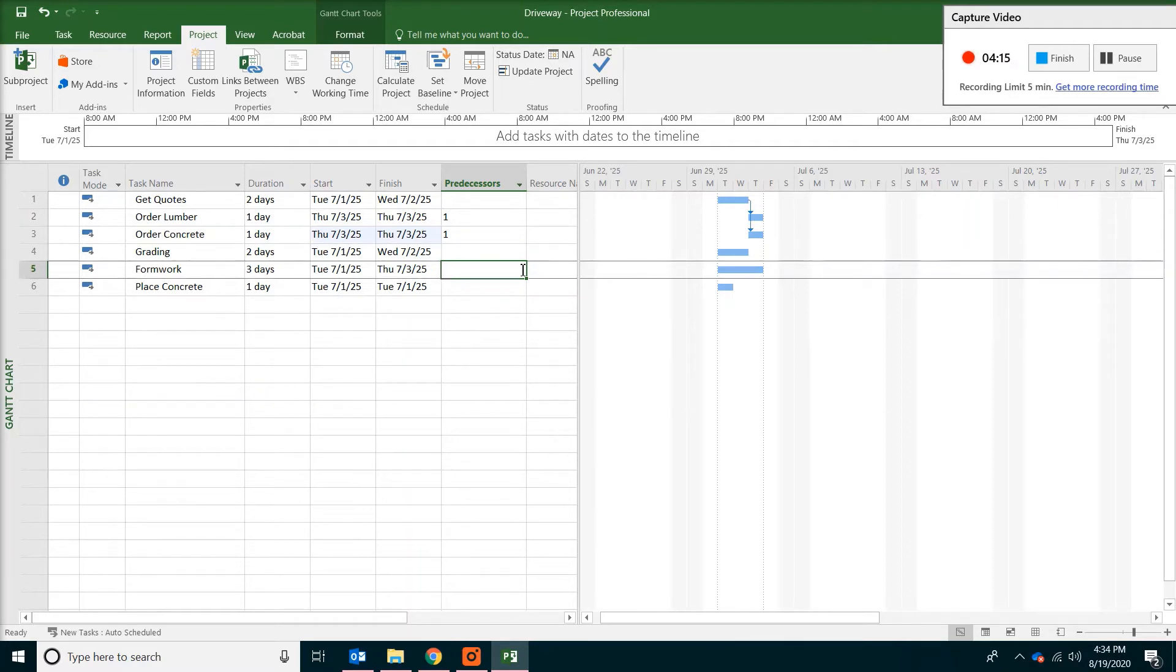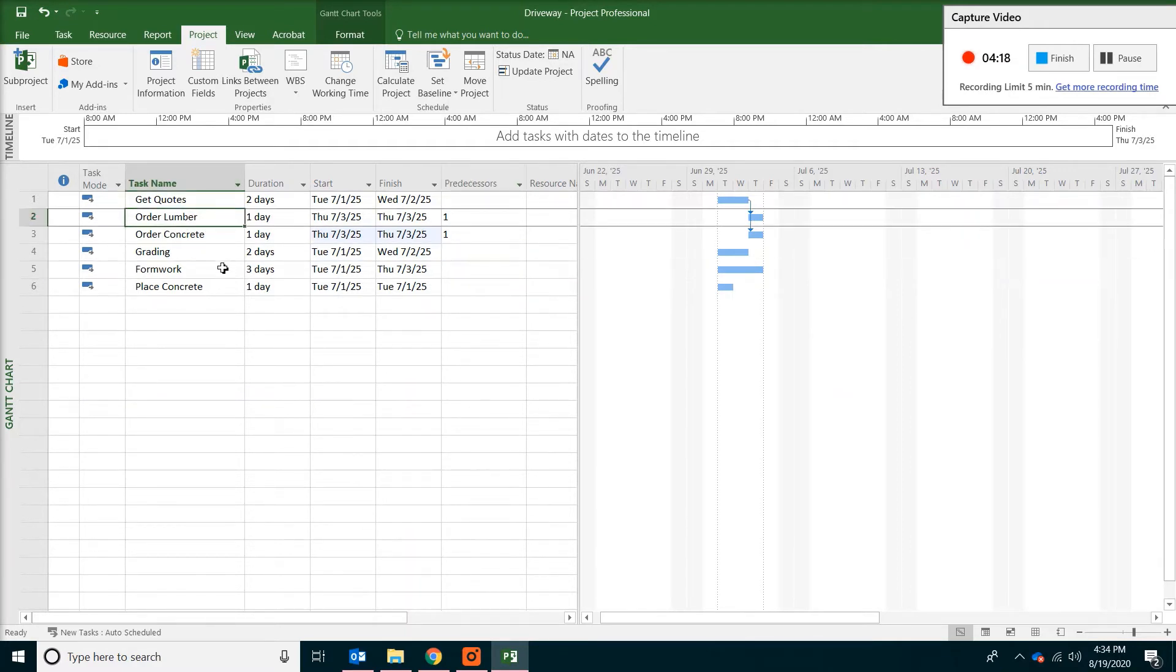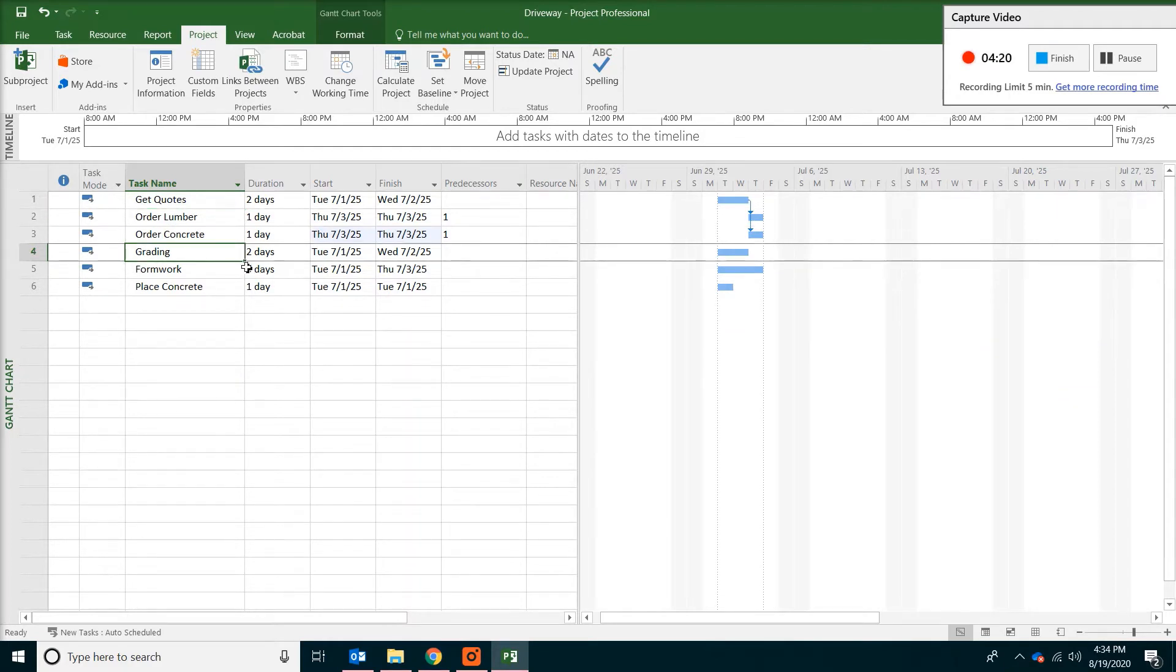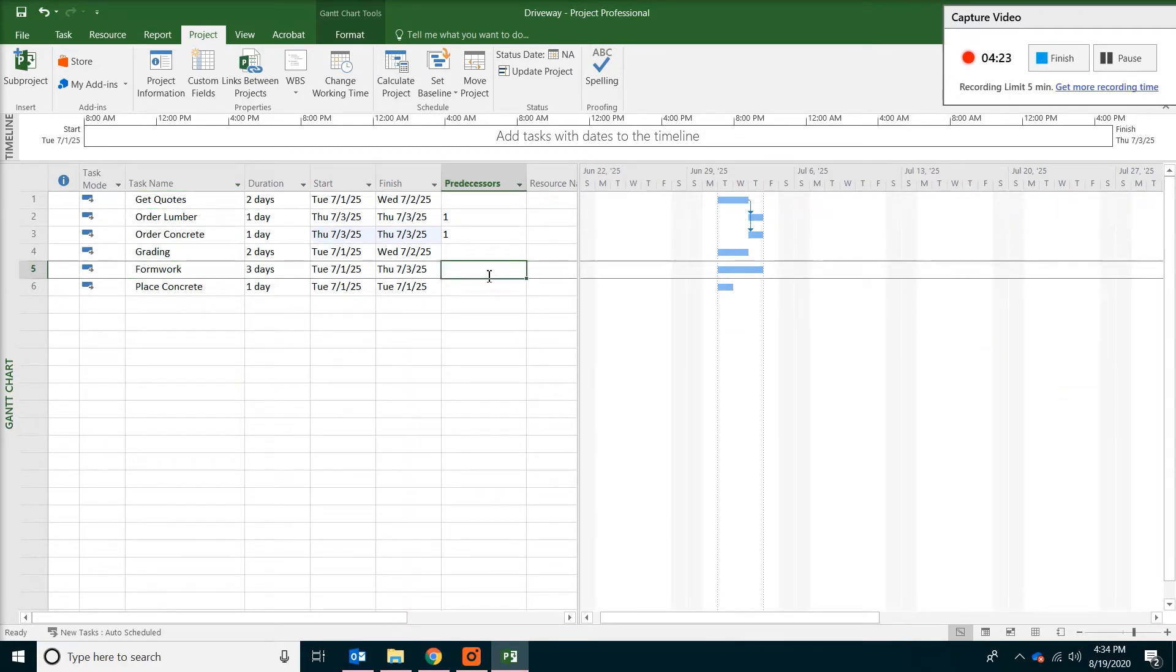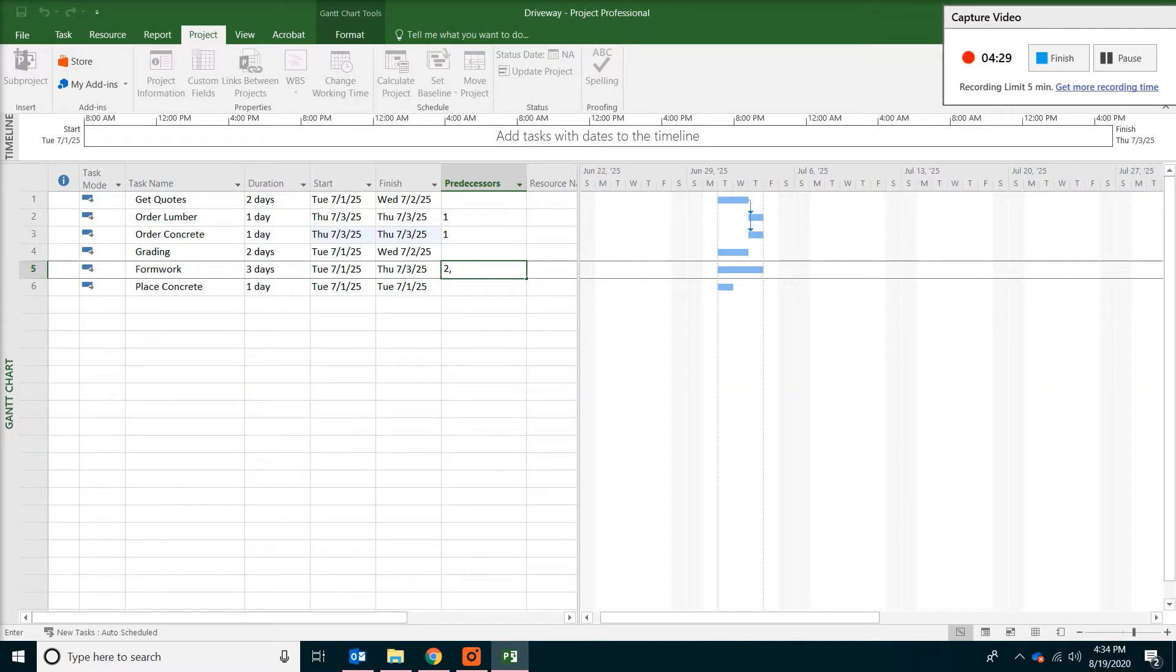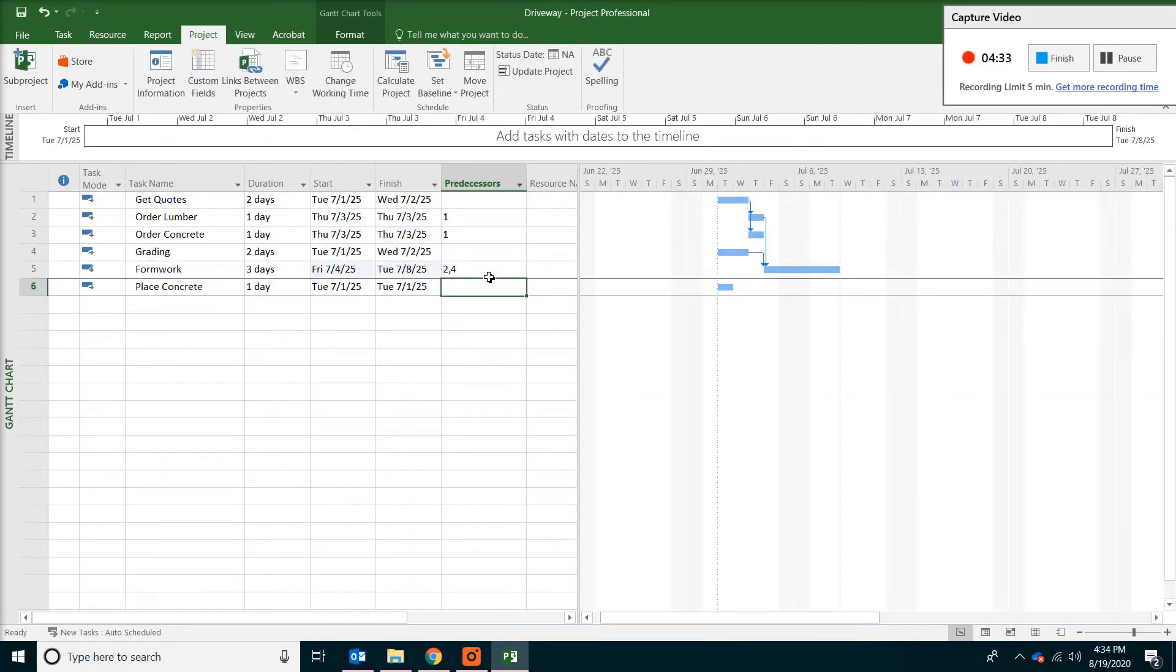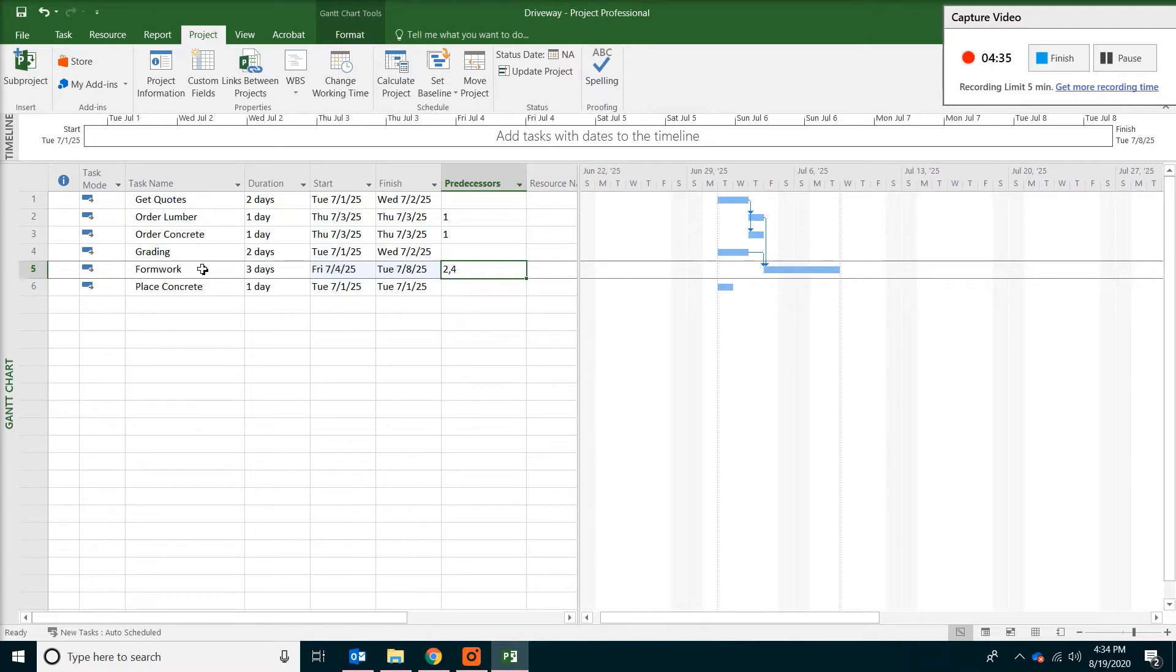The formwork though. You will need the lumber. And also you need the grading to be complete. So what we do is put activity two. Lumber. With a comma. And then type four. Which is grading. So two and four. Both of them they are predecessors. Separated by a comma.